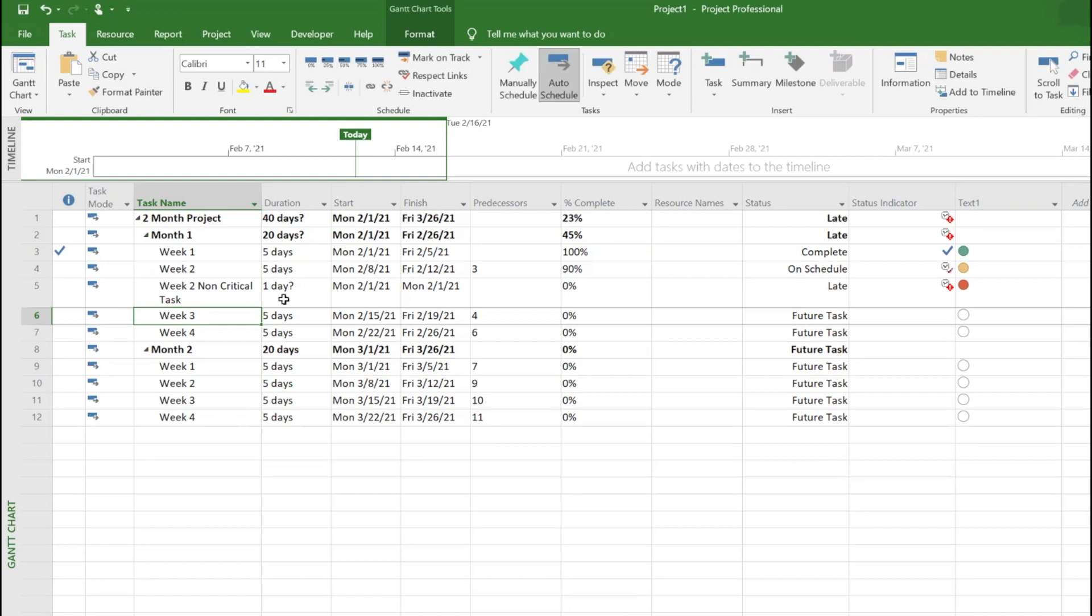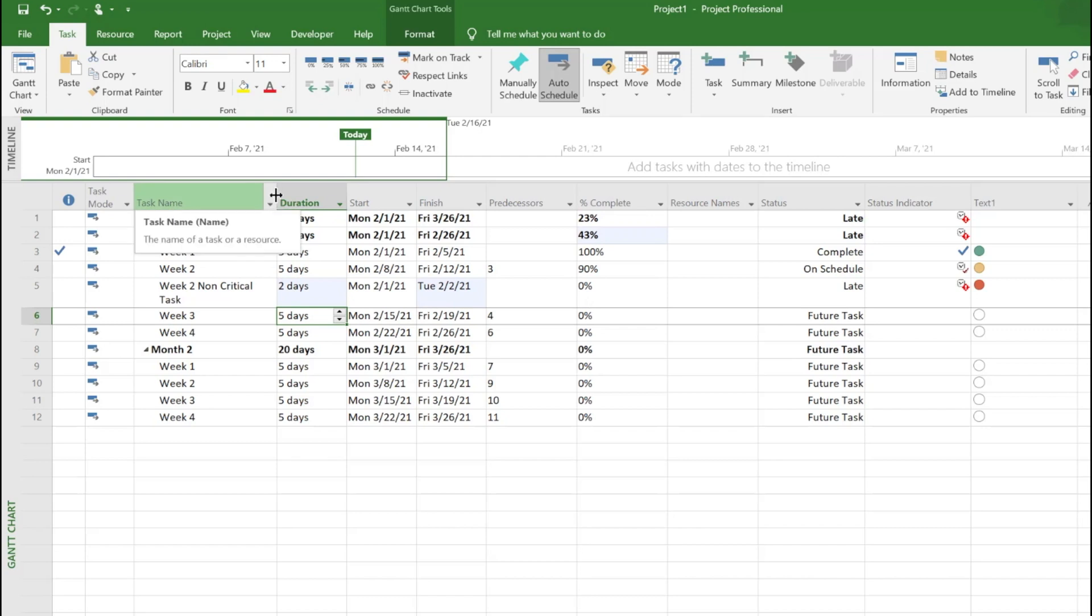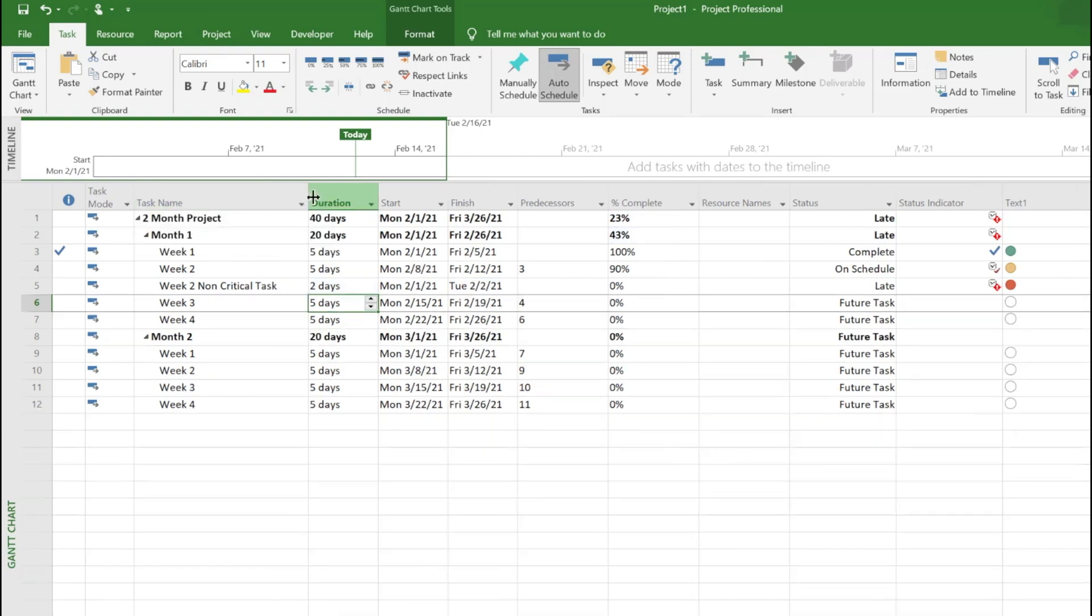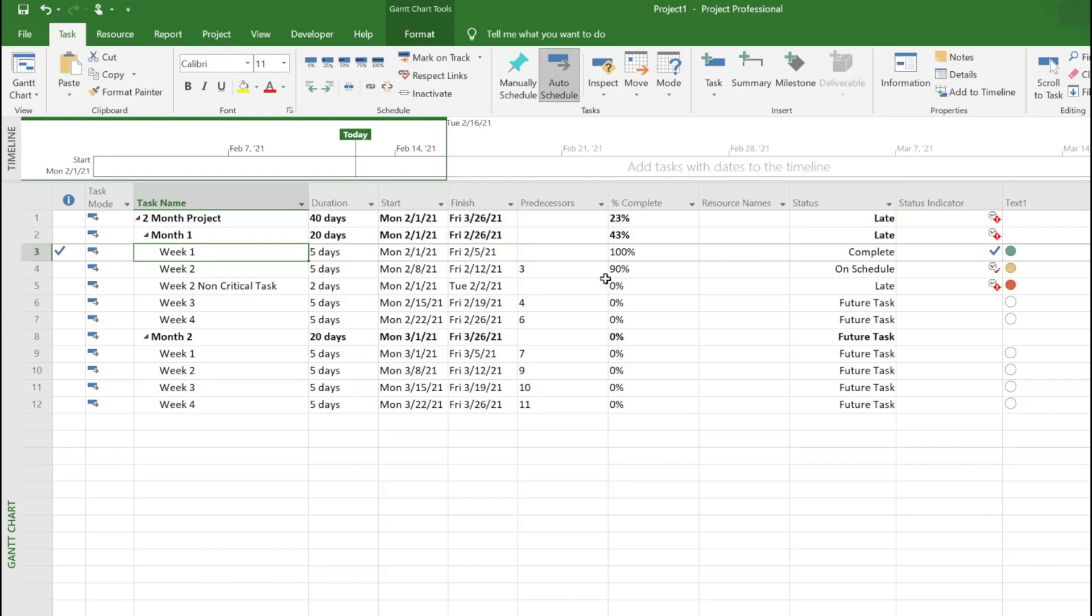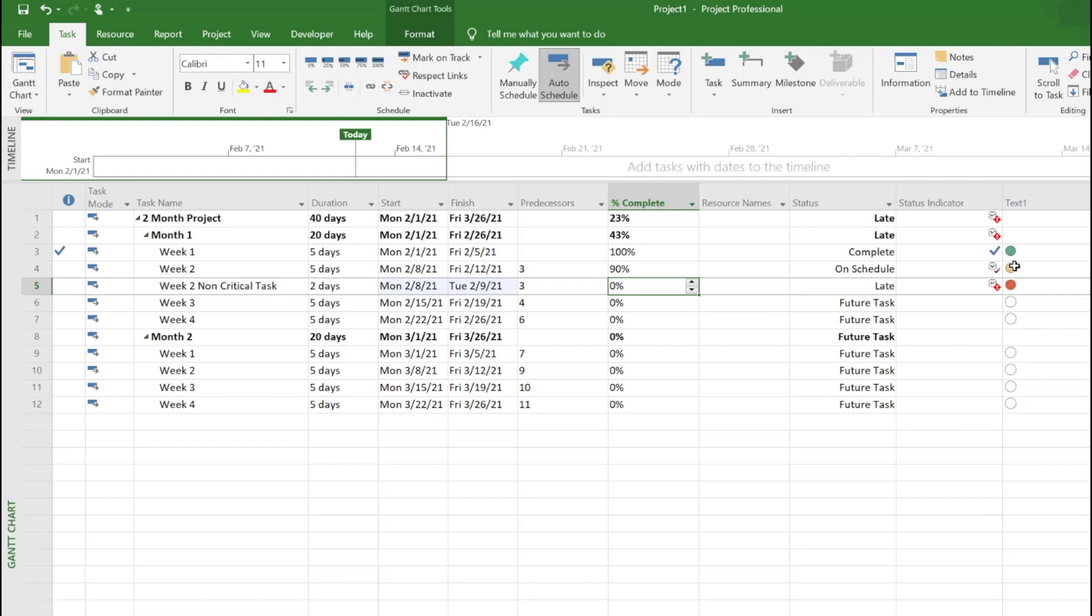Let's say this takes another two days and it's dependent on one, the same as week one which is number three. You can see both yellow and red because it's supposed to be done by Tuesday so it's late. Green is zero, yellow is one, and red is two.